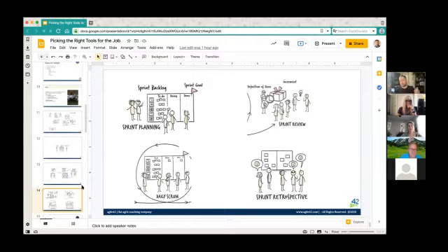And finally, the technically correct answer is there are 5 events. That's confusing. Let's talk about these 4. Right, we go through these cycles of a couple of weeks. We're going to start them with a planning where we build a plan for that couple of weeks. Every day we're going to get together and adjust the plan as needed, right? Because we'll learn things as we go through a couple of weeks.